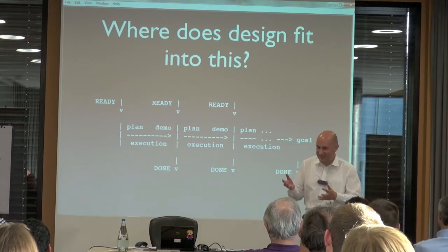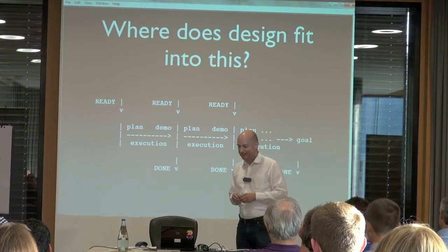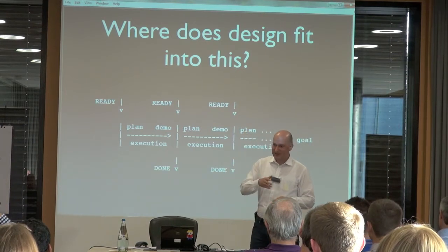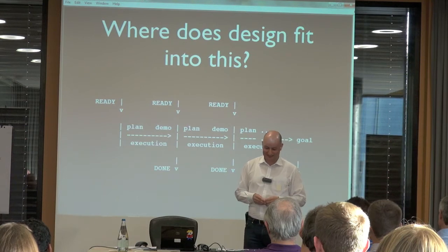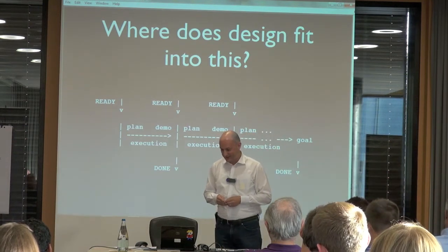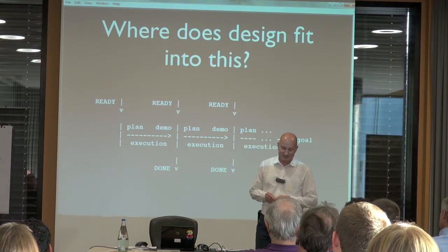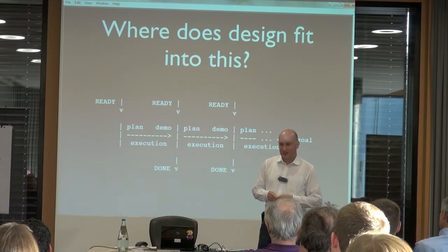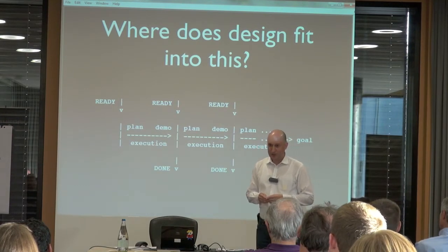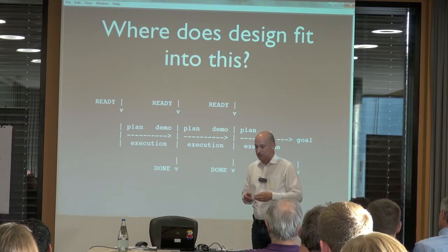It's not yet really tested, and there may be some bugs, that the computer crashes and so on. And let's better wait another sprint until we can put this into production." So done is the set of criteria, really, that you want to be fulfilled for something to be shown at the sprint demo. There's this definition of done.